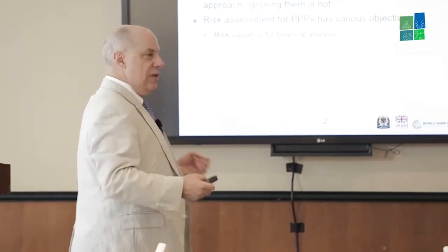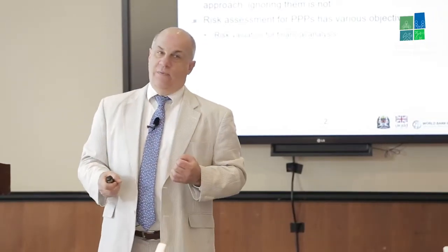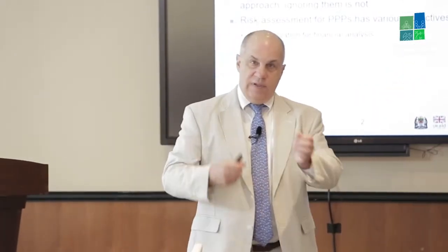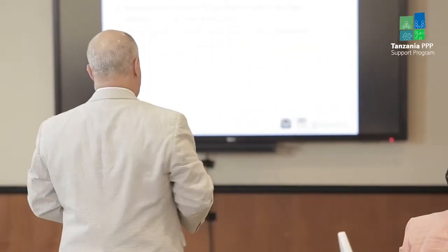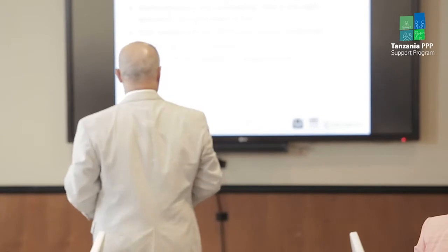So our risk assessment has some objectives, right? We need to understand risk for our financial analysis. It's going to influence our analysis. The risk of inflation could mean higher operating costs. The risk of there not being enough people that use our toll bridge means that our revenue can come down. So it's going to have consequences. We need it for our financial analysis.